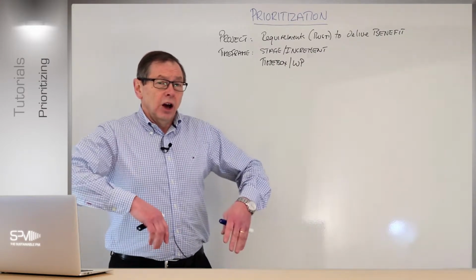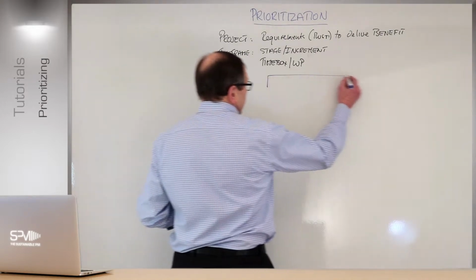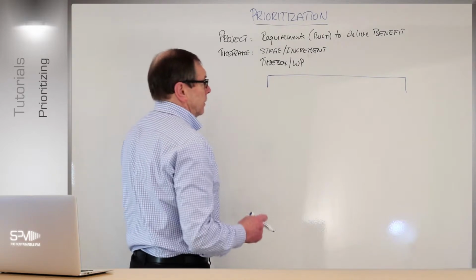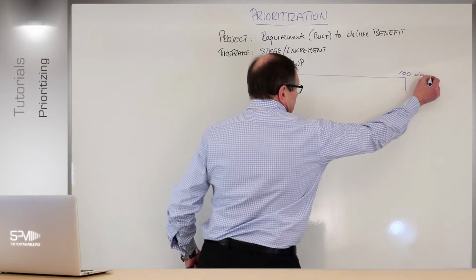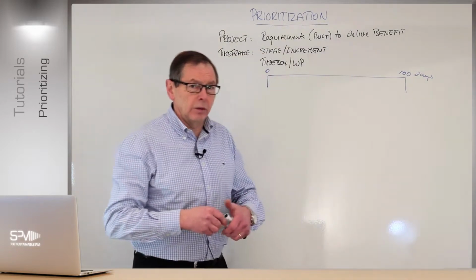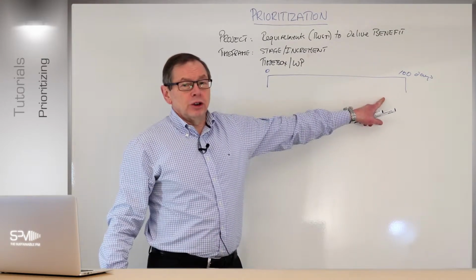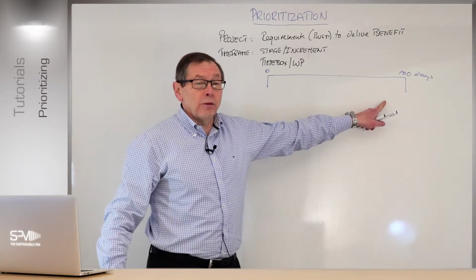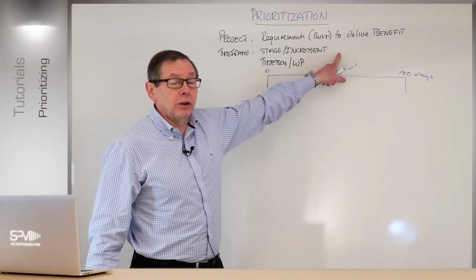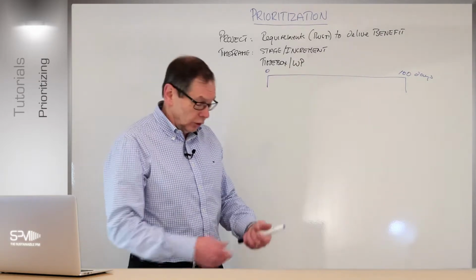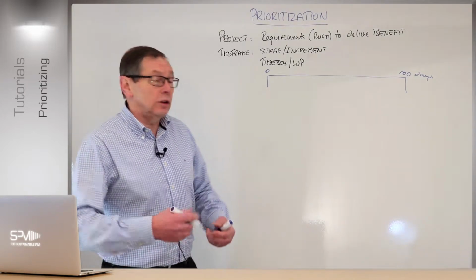Right? Now, there is a general guidance, of course, for the overall project delivery. So if I look at the project plan like this, or the delivery plan from this perspective, right, and I'm running, say, over 100 days, right, this is 100 days, I've not broken up into increments, it's just representative for the moment, then obviously I want a sensible percentage of that time frame delivering the core work, the minimum, the must-haves. I have the minimum requirements I need to have for the solution to work, right? So there is a general guidance out there to work on a 60-20-20 rule, right?